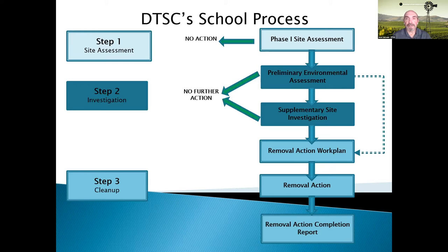This is where the Carquinez Middle School project is currently at, and cleanups are conducted through removal action work plans, or RAWs. Once the RAWs are implemented, the RAW activities are summarized and documented in a removal action completion report. We call those racers. After DTSC reviews and approves the racer, DTSC issues a site certification letter.